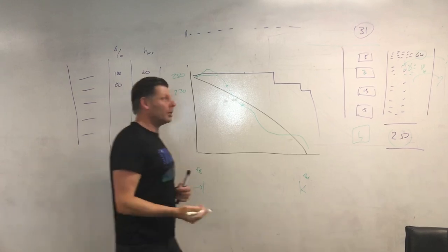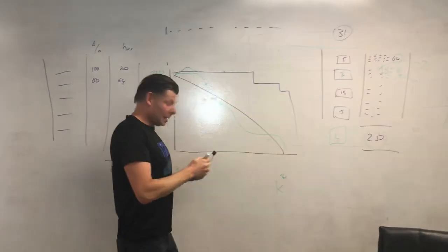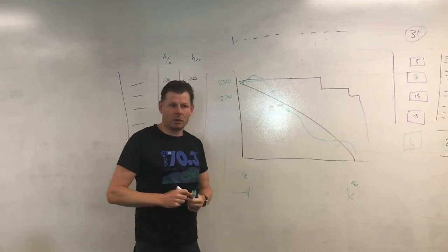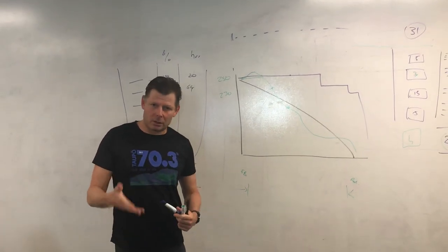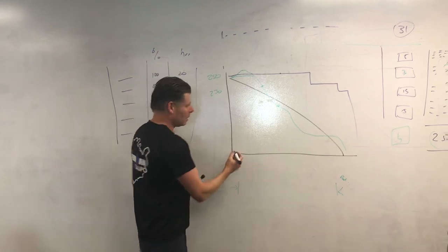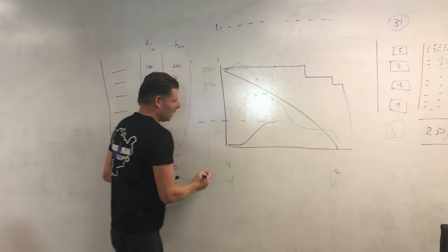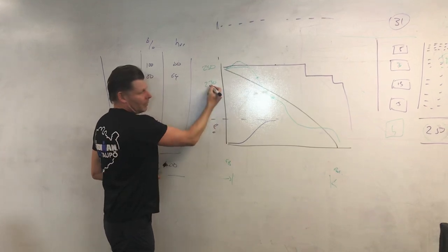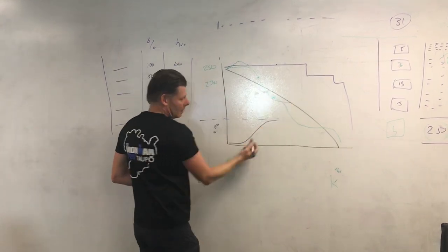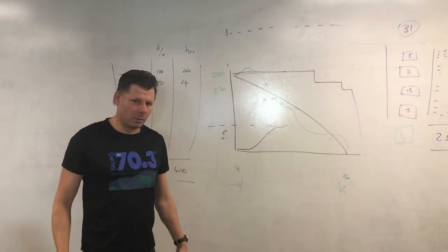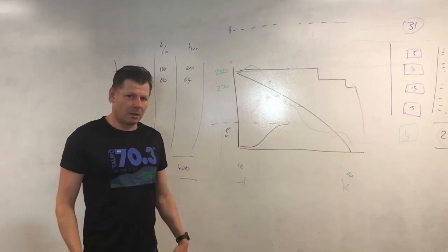Again, as we go along, we may add new tickets. And this is a pro tip here: if you've got unplanned work, so defects or bugs that you didn't know had happened, or new things come in, you can actually burn it up here. So at the end, in the sprint retrospective, we can ask, why did we fail the sprint? Why did we flatline here? Well, because of these things that we didn't plan here. And then we can ask the question, what can we do better about it next time?